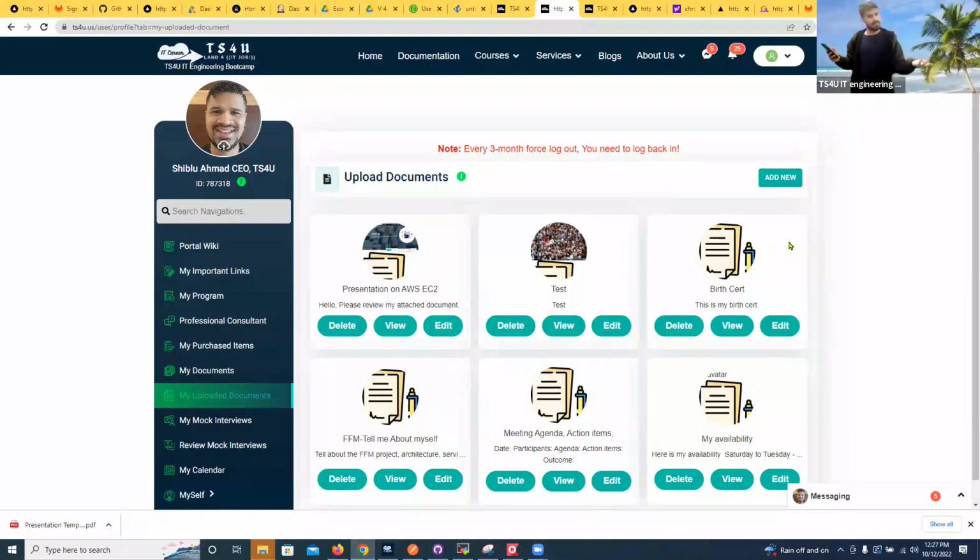There is some problem here. You need to break down that user story. If a user story takes more than 5 days, more than 3 days, it's a problem. You need to break down that user story because the product owner's end goal is to continue to show the value on a daily basis during the sprint. Okay, so we discussed how the point system works.